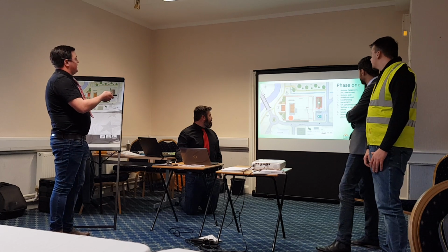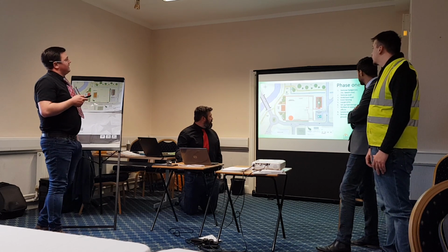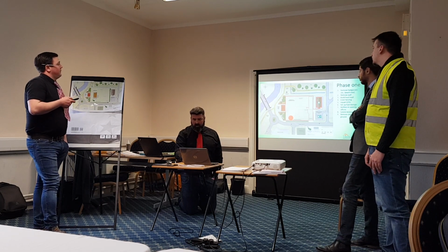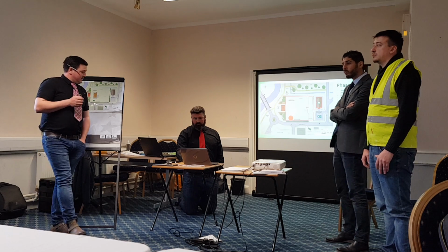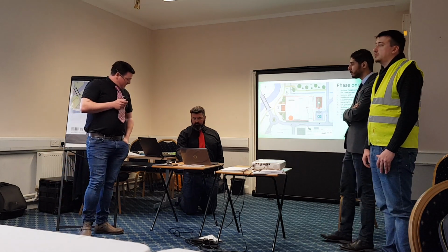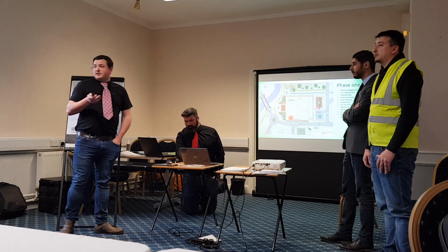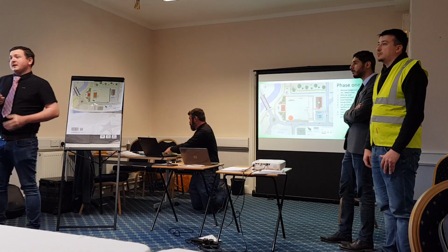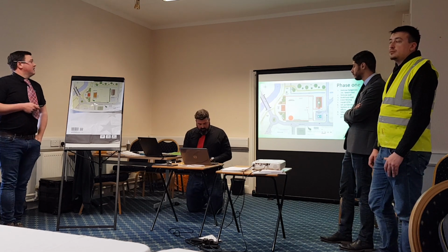This area here around the old factory is contaminated ground. It's contaminated with lead and cadmium. This will be removed, excavated. Any hazardous waste that is removed from site will need to be notified to the HSE. We will need hazardous containment notes supplied to site and collected for our records going forward.